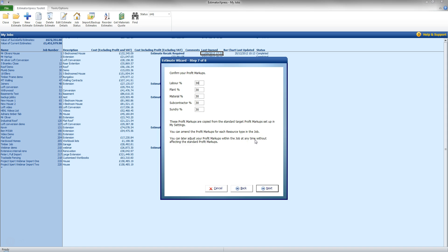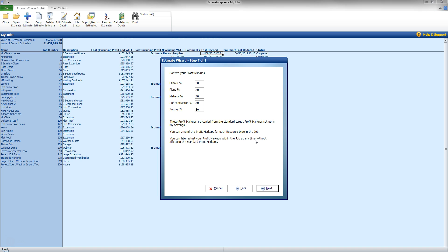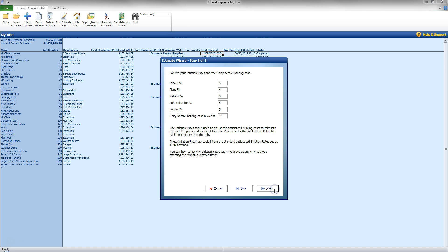Step 7 gives us our profit markups. Now as you can see there, there is a 30% markup for labour and plant, 30% for material, 30% for subcontract and sundry. You can adjust these now or you can return at a later date again and adjust these. But this is where your profit markup exists but the company running costs as well. So as the software is estimating for everything down to the cost of what it is going to cost you to do the build, this is where everything comes on top. Click next.